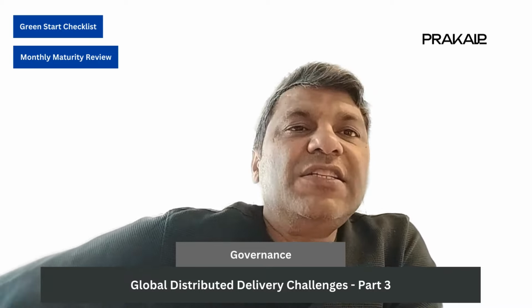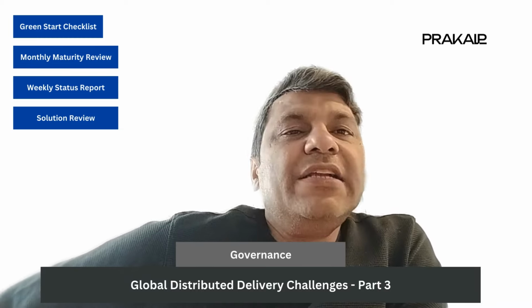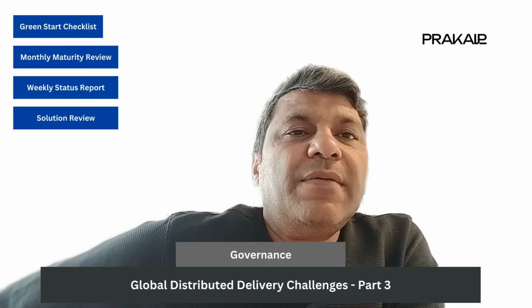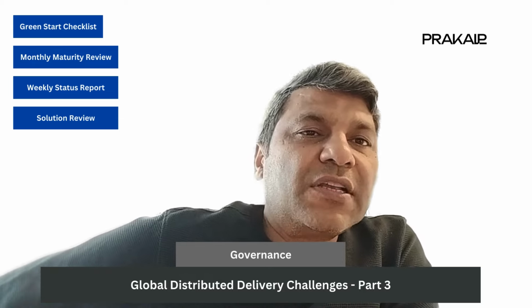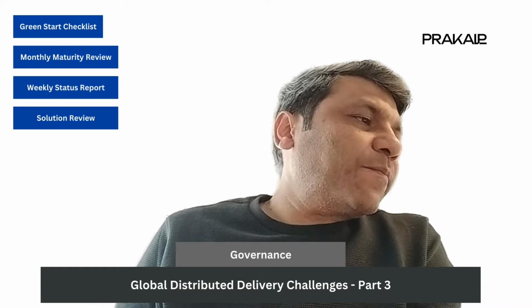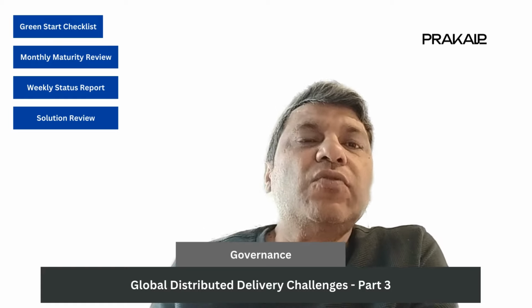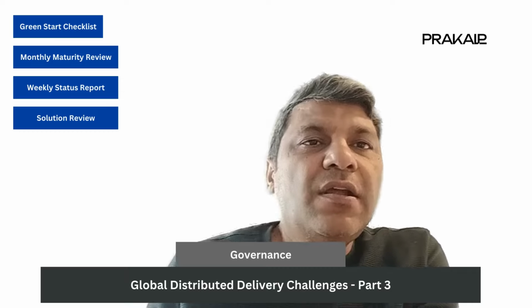The third is your weekly status reporting, which is sending out the highlights and lowlights of the week to the customer to keep them updated on the progress, and to transparently share issues and concerns which are coming up on a weekly basis. And lastly, there should be a solution review, which is not typically adhered to,